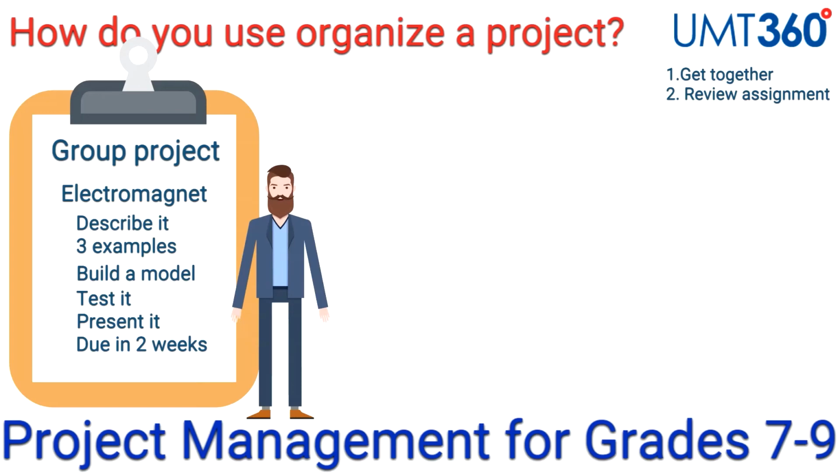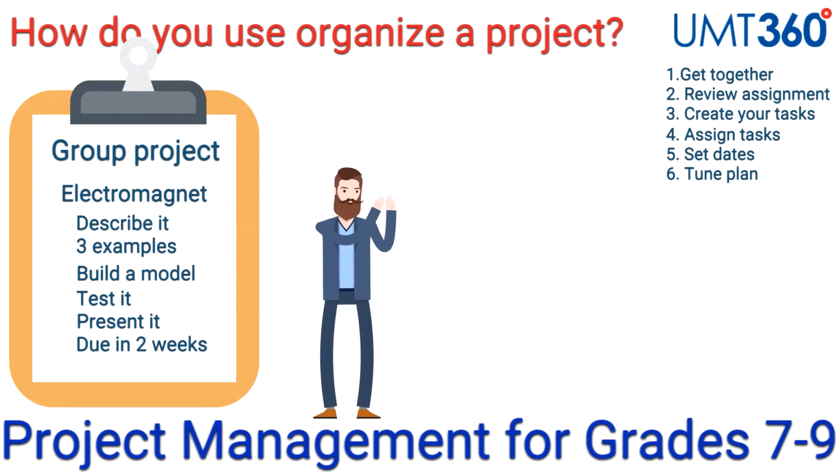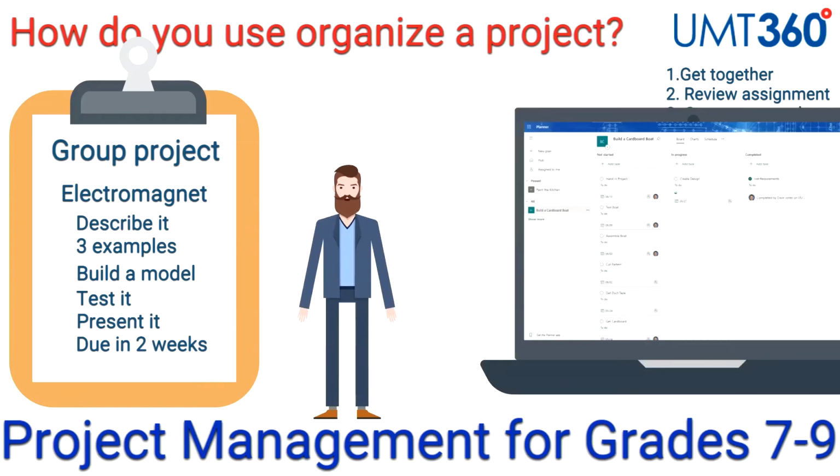Once you know what you're going to do, you need to break the project into doable pieces of work you and your group members can work on and create these tasks in Planner. Using the interactive capabilities of Planner, you can also assign tasks, set dates, and tune your plan using the task cards, buckets, and schedule views in an interactive way with your team as you collaborate on the plan. This means that you're free to assign work, set dates, and move tasks around at any time as you're developing your plan. Let's jump into Planner and see how this works.